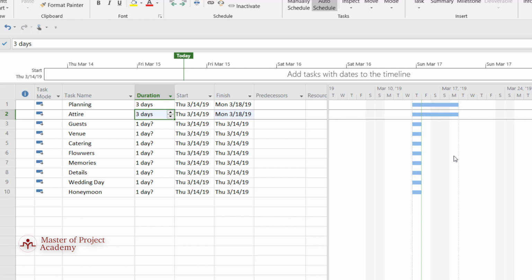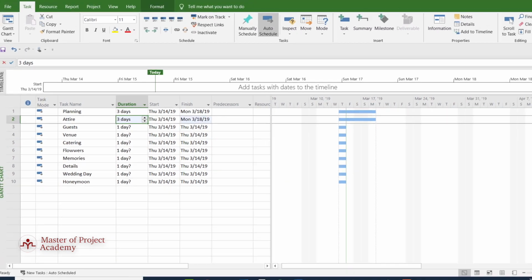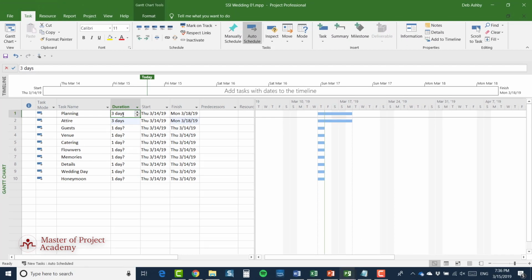And we've talked about the project's start date. Supposing I was entering this project and in fact the various aspects of it had started a couple of weeks ago, I'm a bit late setting this project up in Project 2019. So some of these things may have already happened. What I could do is change the project start date. So look, for example, at that first planning task, which says it starts on March the 14th. So that's the date that I entered it yesterday, and that is currently the start date for this project.